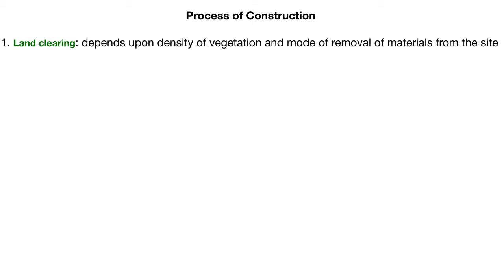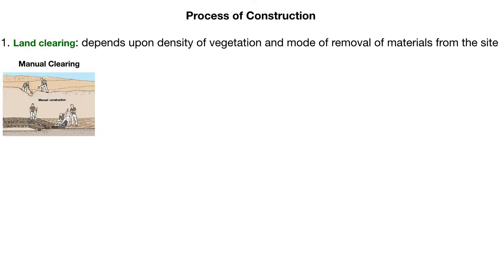The first operation in the construction sequence is land clearing. The site must be cleared of big boulders, stones, trees, and bushes, and the land must be leveled if there are steep slopes or broken surfaces. There are three types of land clearing methods based on the density of vegetation. The first is manual clearing: if there are only small boulders and thin vegetation like small bushes or trees, the site can be cleared by engaging laborers.